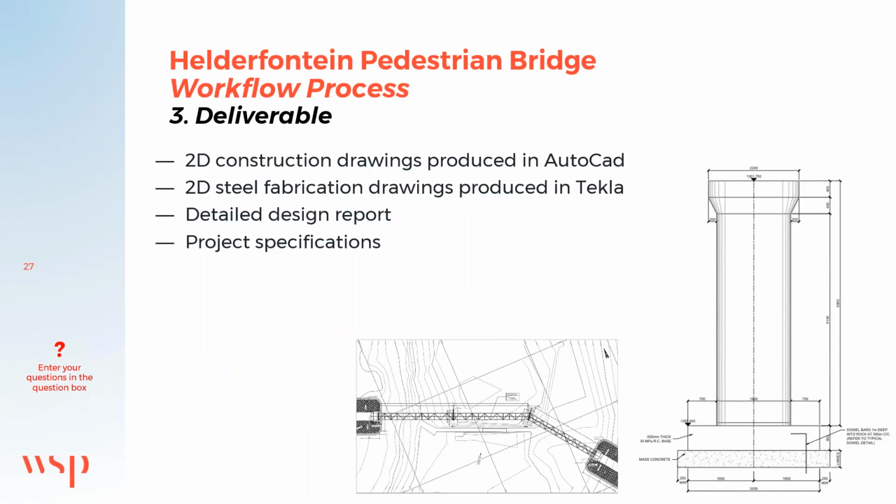Finally, step 3 of the workflow process consists of the final deliverable. This consists of 2D construction drawings produced in AutoCAD, 2D steel fabrication drawings produced from Tekla, a detailed design report, as well as project specifications that we utilize in the tender process.